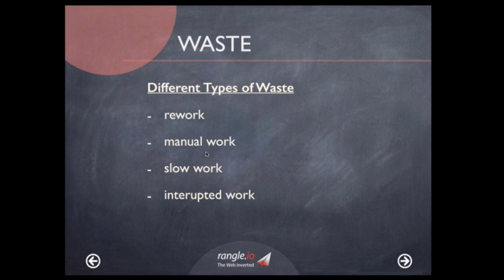And one of the key things with software development is the cost change curve. The further you go in the software lifecycle, the more expensive it gets to make changes. And so anything that really optimizes the elimination of risk up front is great. The downside is that it's too hard to totally eliminate risk, and so you have to also embrace change, as with Agile, and when you find the right combination of techniques, you get the best of both worlds.